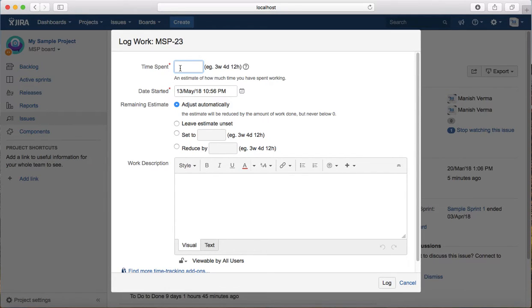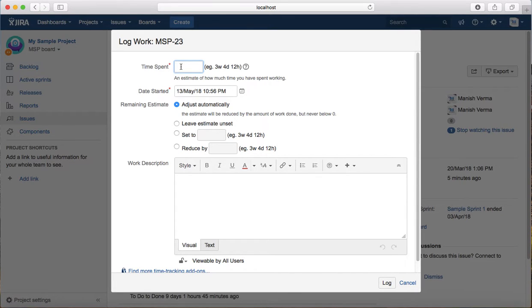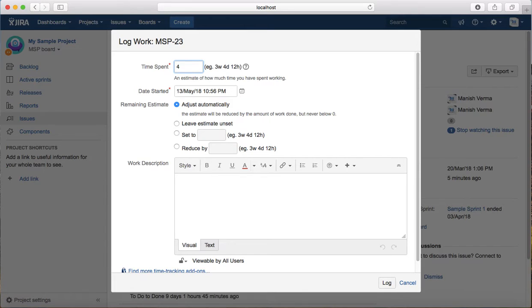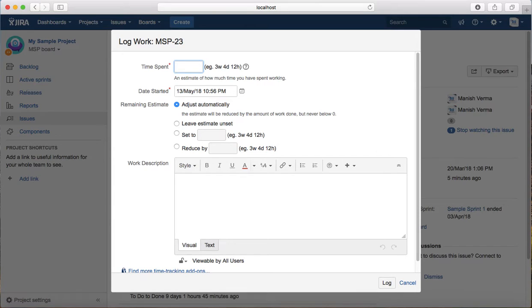In the time spent text box, enter the value. For example, if you've spent four hours, enter 4H. If you've spent one day, enter 1D. Or if you've spent one week, enter 1W.